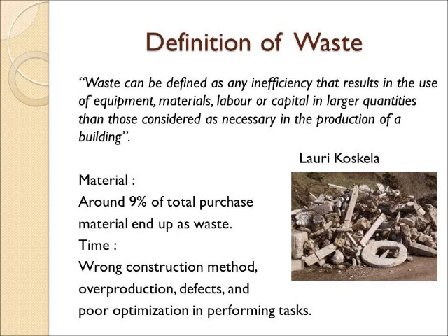Waste can be defined as any inefficiency that results in the use of equipment, materials, labor, or capital in larger quantities than those considered necessary in the production of a building. From the survey based on construction industry data, according to the Lean Construction Institute, 9% of the total purchased material ends up as waste by weight, and 1 to 10% of every single purchased construction material leaves the site as solid waste by weight.